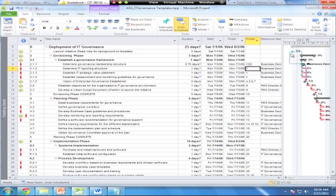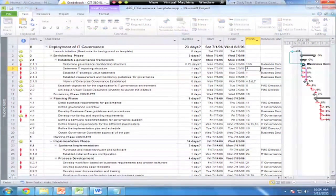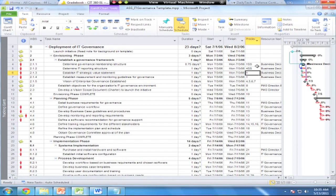The arrow now shows these two tasks can start at the same time. I'm scheduled to start them around July 3rd, and it's saying these tasks can now start simultaneously — I don't have to wait for one to start before the other. To make it even clearer, I can do the same on another task, like 'Determine IT Reporting Structure,' typing 4SS. There went the arrow again. Just to demonstrate how predecessor relationships work, I'll go back and leave that as a 1.